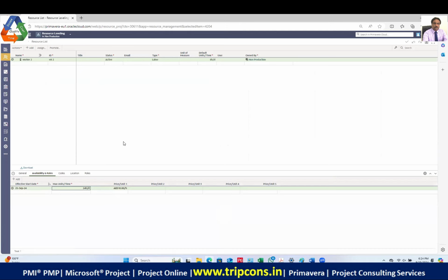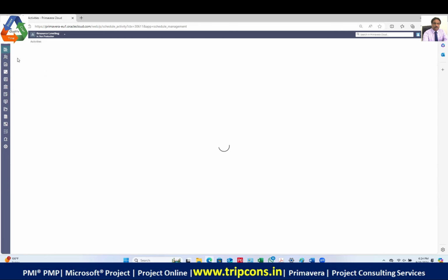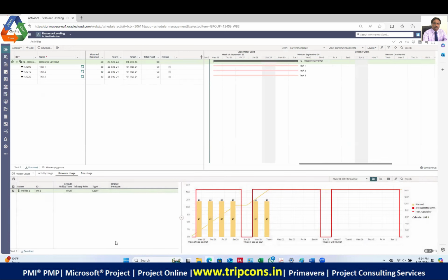So guys, tell me one thing. What is the capacity for 4 people per day? What is the man hours? 32. Correct. So I write here 32 man hours per day, right? I should write 32. It is in the multiple of 8. Now, if you look at the graph of your activities, how is it going to look? It says that, okay, the granted capacity that you have is for 4 people, but you are not using 4 people. It's okay. You are using only 3 people per day.